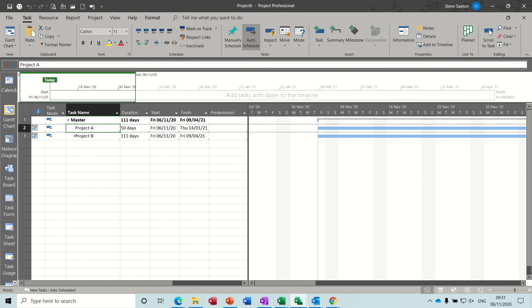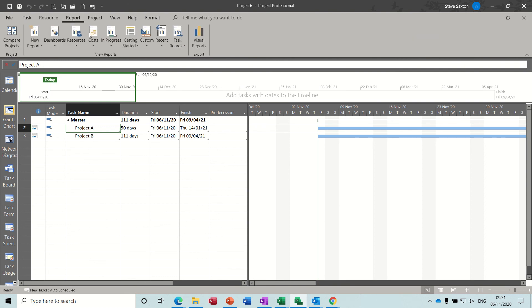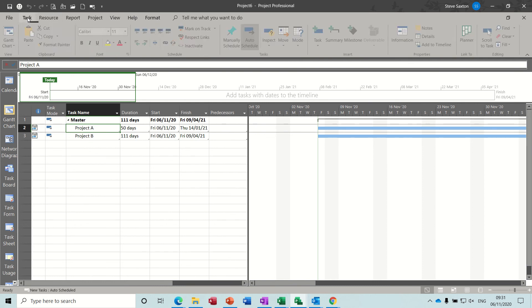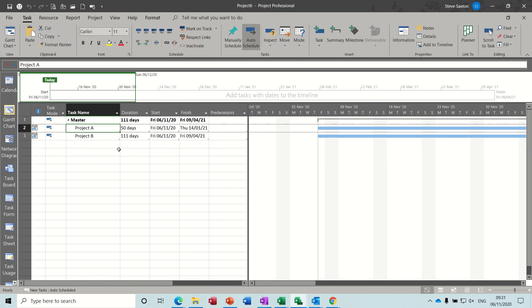And I think it's a good tool to use to do reports on. So you can then go into reports and create reports based on this information. And send that up the chain to whatever management level you need to send it to. So there's two different ways of doing it. Inserting the sub-project or using paste special and bringing individual lines in. But both ways, it's a great way to manage multiple projects.